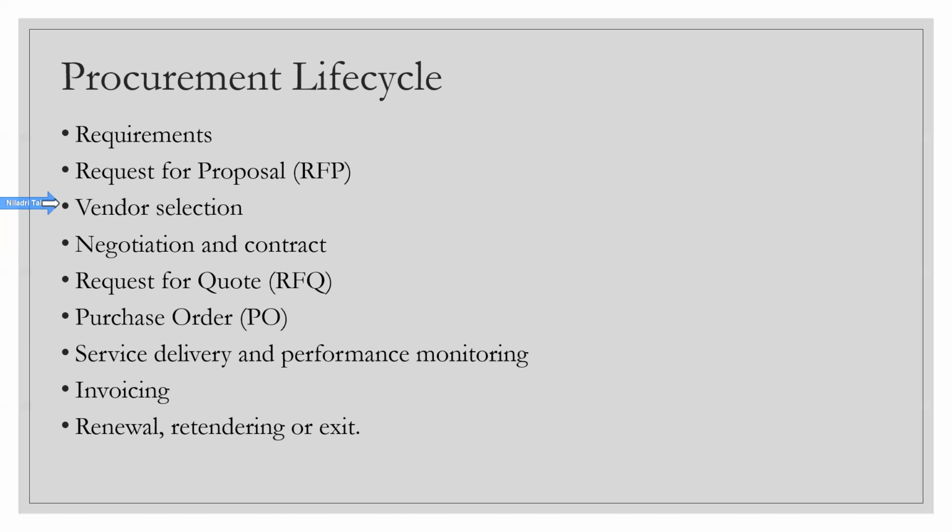Like they will say, okay, I will get the construction guy to get the DC built. I will get the cooling company. I will get the power company. I will get all the integrators, electricians, and all the verticals they will arrange and give it to you. So from Amazon, the parent company or the buyer, you probably just have to supervise it. You supervise the vendor. You both agree on a schedule which is signed off. You prepare all the milestones, and then you just do the daily stand-ups or weekly calls or status reports, and you find out where we are standing at any point of time in terms of CPI and SPI. So that's about the negotiation and contract.